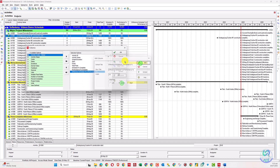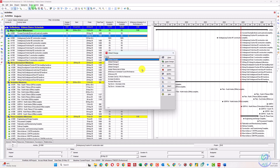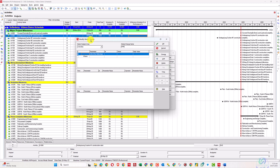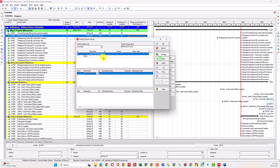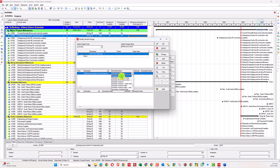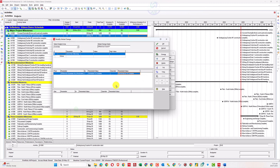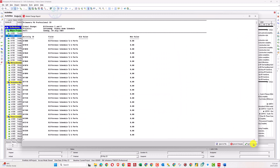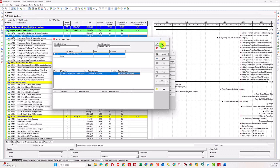Press OK to edit and center the column. Now go to Global Change and create a new global change. Name it 'Difference Schedule and Performance (S and P).' Add the user-defined field column 'Difference in Schedule and Performance,' then type the formula: Schedule Percent Complete minus Performance Percent Complete.